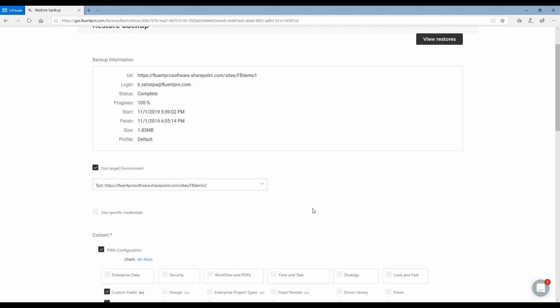But if it is not, what happens if this is slightly an outdated version, or on the contrary, it doesn't contain the needed change? Then you need to go back in time, choose another backup, and restore again, preferably to that test environment, so that you don't lose the data in production immediately, and you are able to recover the part that has not been corrupted.